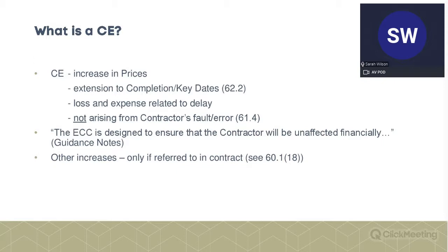That could be really damaging if the variation was a big amount of work, because the contractor could find that it's doing the work at a loss because it put loss-making rates in the contract. That's not supposed to be the case at all on NEC.